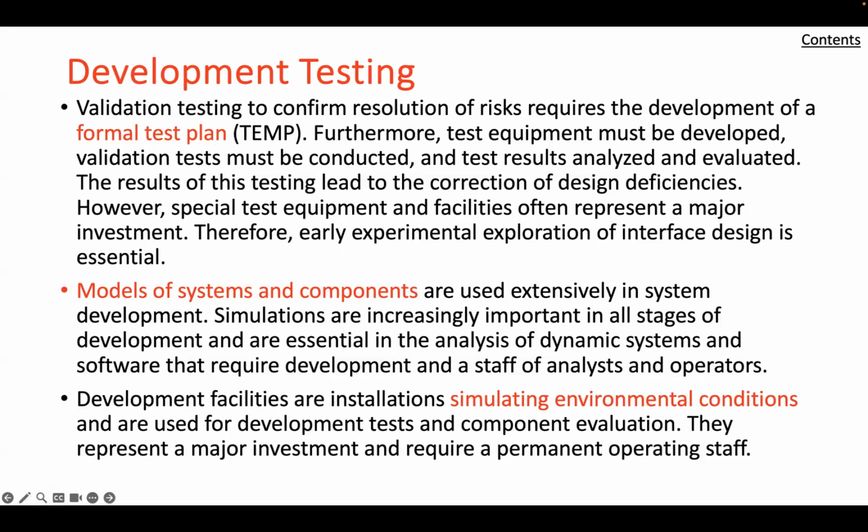Development testing, on the other hand, is on subsystems and components and is conducted by the developer. A well-planned development test program generally requires the following: development of a test plan, development or acquisition of test equipment and specialized test facilities, conduct of demonstration and validation and test, analysis and evaluation of test results, and correction of design deficiencies.